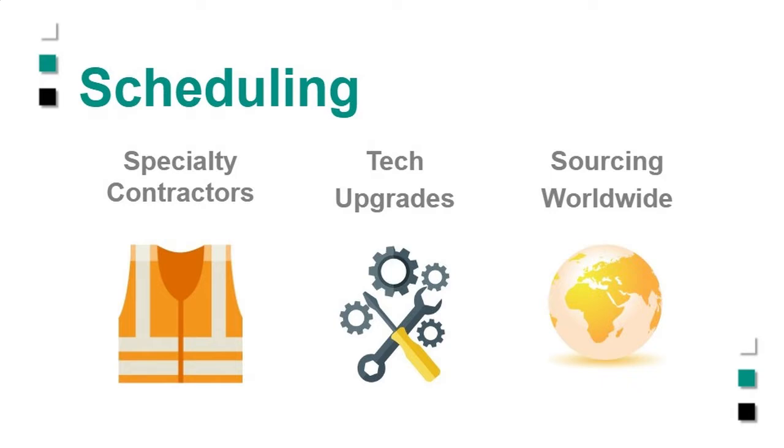Daily is tough if you're in a big capital project, but certainly if you're in a smaller project, smaller in terms of length, you want to get frequent updates. If you're in a maintenance environment or a turnaround environment, you have to strive for daily, no doubt about it. It definitely depends a bit on your specifics.